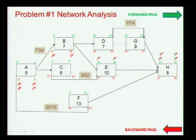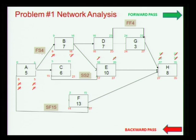Any questions? When you do the analysis compared to AON, you have to be very careful as to how you go back and forth on relationships. So what is critical? A, B, D, G, H. In the next lecture, we will see how criticality is not sometimes the start or the end. In this particular case, it is only the finish of G that is critical. The start of G is not on the critical path, but because duration is held as continuous days, the start is being pulled in with the finish.